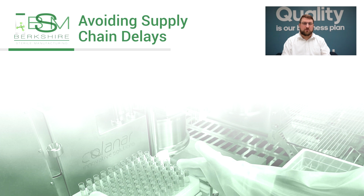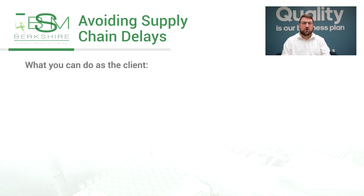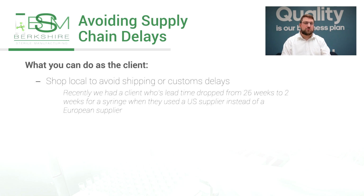During the pandemic, we purchased years' worth of stock for common containers and components to help our clients avoid supply shortages. But there are still things that can be done to avoid a significant delay that could derail your project. Shop local when you can to avoid shipping or customs delays. We had a client that wanted to source a vial from Europe, and the lead time was over 26 weeks. We were able to purchase a similar container from a US supplier, and those arrived within 2 weeks.